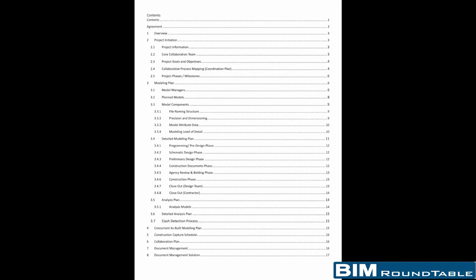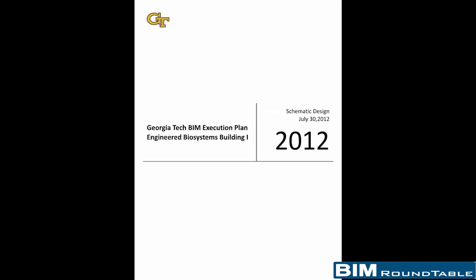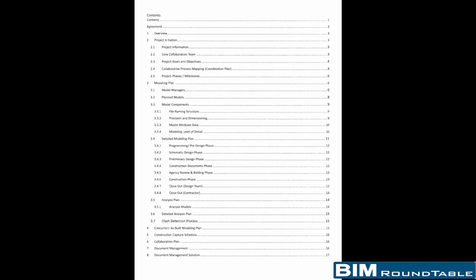So, all right, let's move on to the example that was used. This was schematic design, and they're currently in construction documents now. I believe they turned in a DD one, but I haven't seen it. I thought it was good just to show this one because it was their first stab. The DD one would just be an update to it, because we require one at every phase. Some things might have changed. There were a couple of things that still said to be determined in schematic design, but that was tightened up a little better.